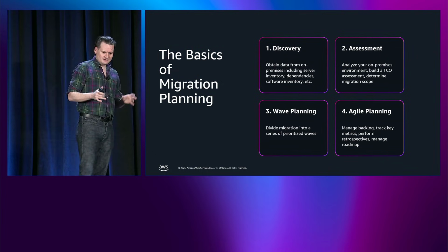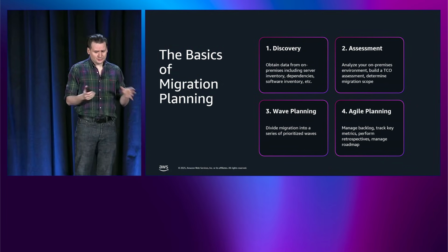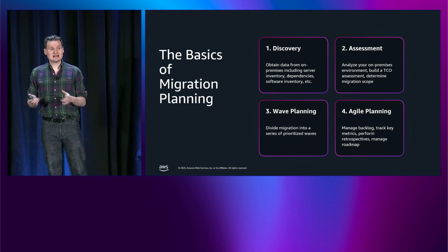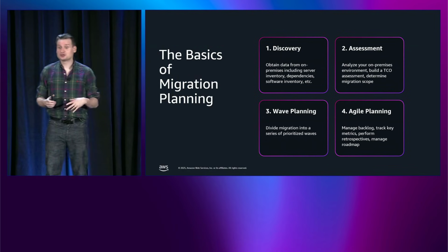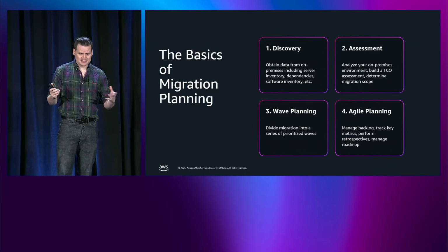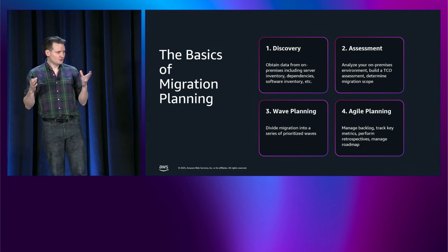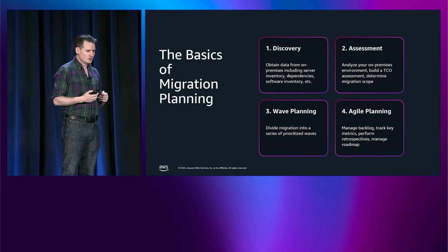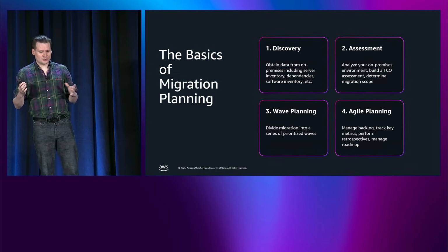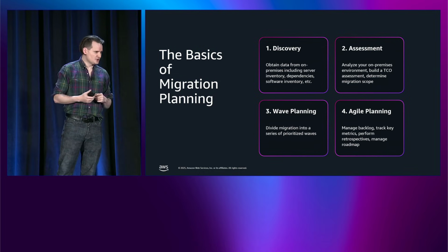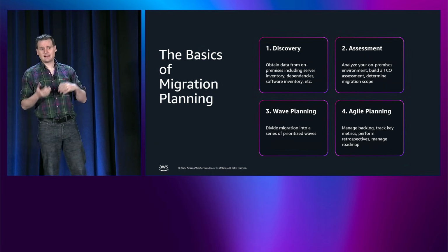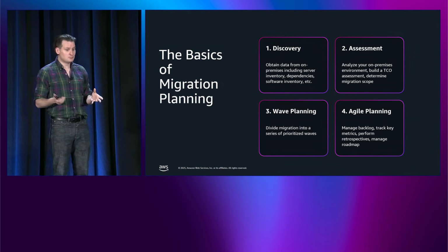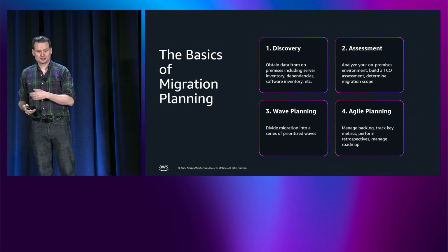Now, lastly is agile planning, because ultimately, something that I really want to stress that will come up a few times in this talk is that a migration is an agile project. You should treat your migration as you would any software engineering project and apply the same tenets and principles that you would to the majority of software projects. Think agilely and think about how to enact your wave as an agile project. And that involves setting up all of the ceremonies, managing your roadmap, your backlog, doing retrospectives, all of that good stuff, and thinking about how to employ the mechanisms that will keep your migration execution on track.